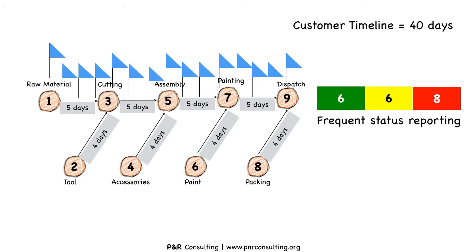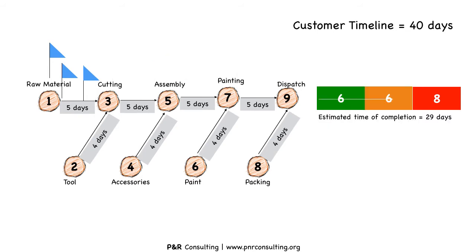An important prerequisite to achieve monitoring effectiveness is frequent status reporting. Let us understand the effect of frequent status reporting in monitoring. In the Q project, assuming an activity startup delay of almost 5 days, we could notice the penetration in yellow zone — the estimated time of completion is 29 days. In the next status report, we get to understand that the project is moving very slowly and the penetration is noticed in the red zone. This is the time for top management to intervene and bring the project back on track.